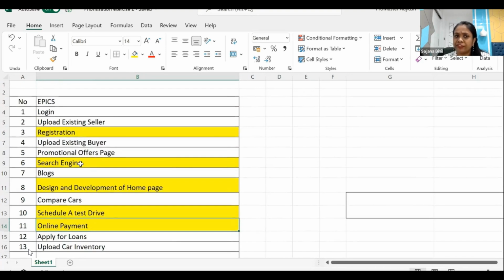Now let's look at the features that we have not marked. Okay, I've marked these features. So this will be your first step, guys. Before your prioritization call with the customer, go through the backlog and think about the items in the backlog for some time, and then mark out these items. Which of these items are of absolute benefit and are absolutely mandatory for the release? Okay, so that's the right word. When we say it has maximum benefit, we also are saying that it is absolutely mandatory for the website to function.